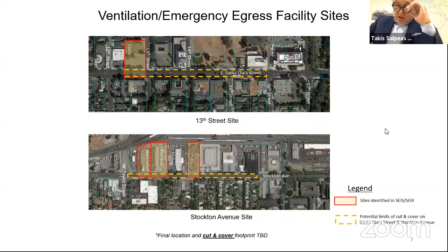Yes, I do not. I only know the standard criteria of what it will take to stop a train underneath, like we explained. The center platform on the icons you saw there, they're going to need 750 feet. The length of a standard BART train, 750 feet. For sure, we need to provide a 750 feet platform.